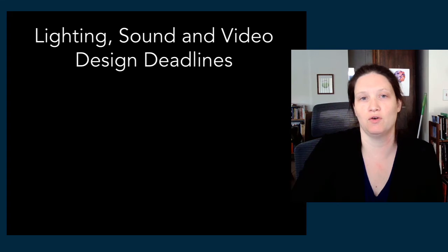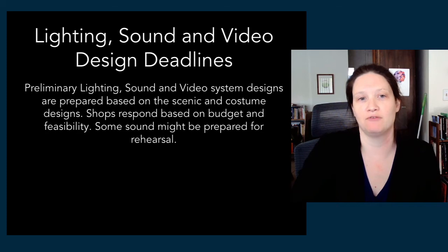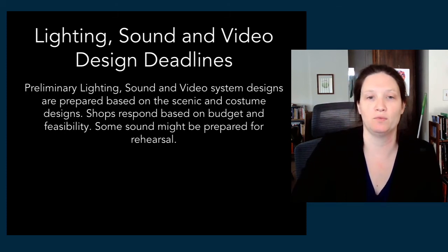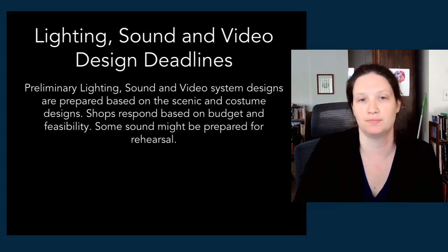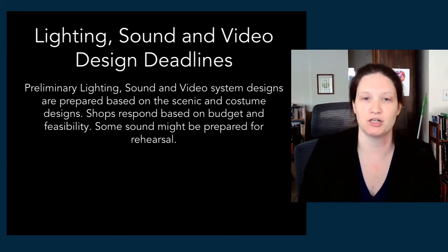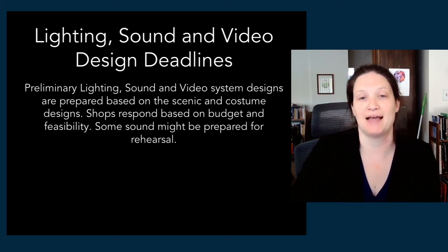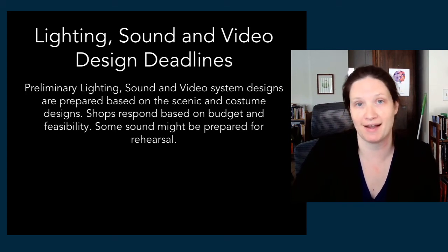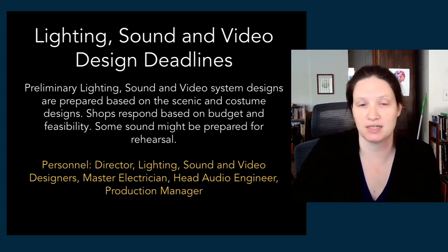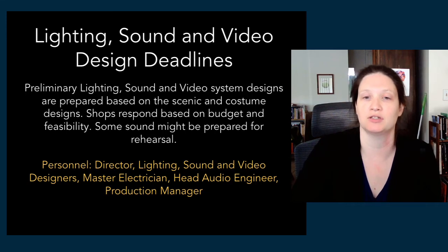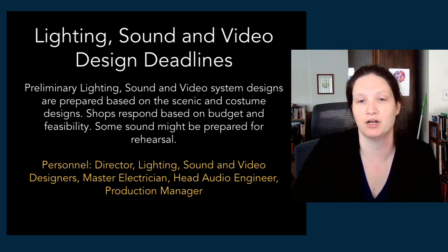So as your show starts going into rehearsal, you may have preliminary lighting, sound, and video system designs that can be prepared based on those scenic and costume designs, right? Again, we have our shops take a look at those initial preliminary design deadline products, and then they respond based on budget, feasibility, etc. Sometimes sound is prepared before rehearsal so that you have access to it to work with in the rehearsal process. So this is your director, once again, involved in these preliminary designs, your lighting, sound, and video designers, master electrician, head audio engineer, and production manager.